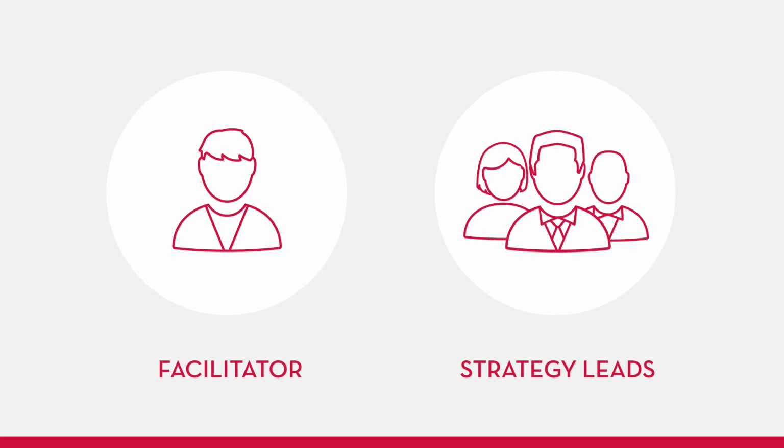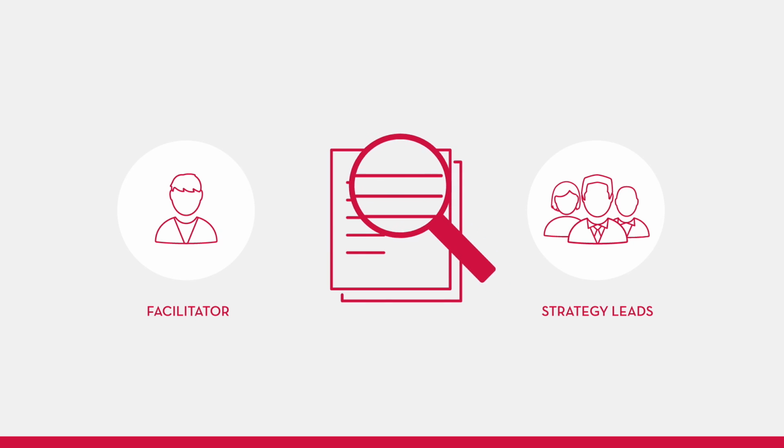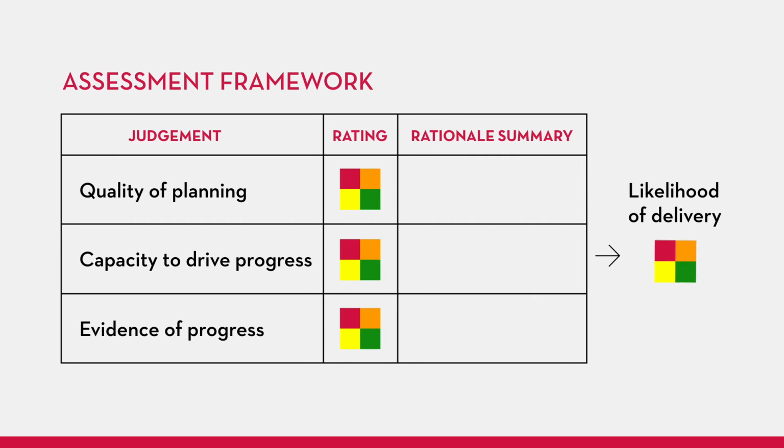During this step, the facilitator will work with the strategy lead to collect and analyze relevant data, which may be quantitative data, qualitative observation data, or other information. Then the team will use the assessment framework to come to a judgment about how well implementation is going. The assessment framework asks the strategy lead to rate implementation in terms of the quality of planning, capacity to drive progress, evidence of progress, and the strategy's overall likelihood of success.